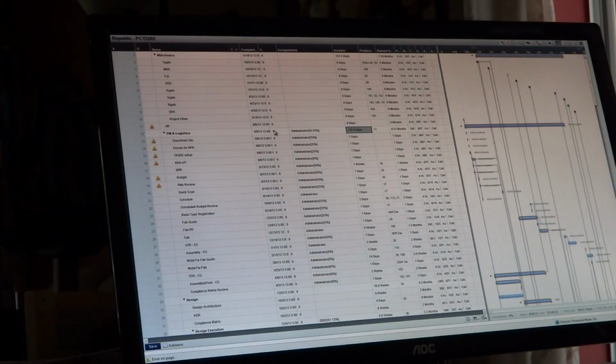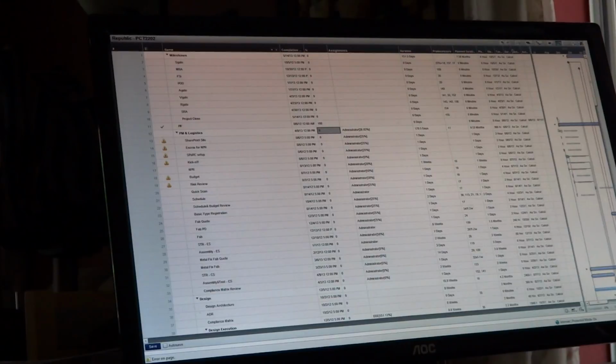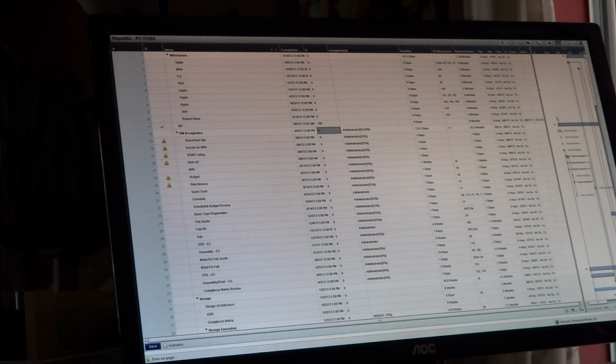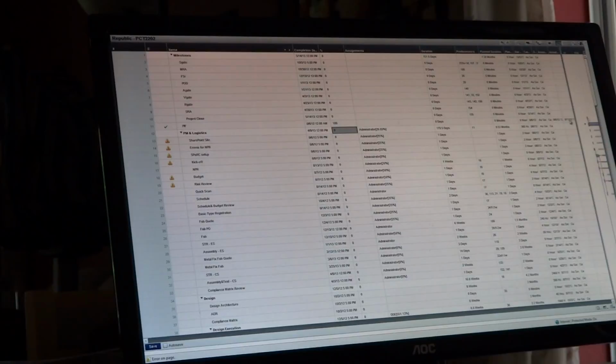So back here, and there's complete. Cool, I can see the actual starts and actual finishes. So it took the actual finishes today, because that's what I entered, but I really want to change that. Let's see if I can change it in the new version. Now, okay, so this to me is frustrating because I'm entering actual progress. I don't enter it every day, so I'm going to enter it like once a week. But this is going to screw up my planning, or at least my records, if when I mark it complete today, it says it's complete today. Well, I want to update that.